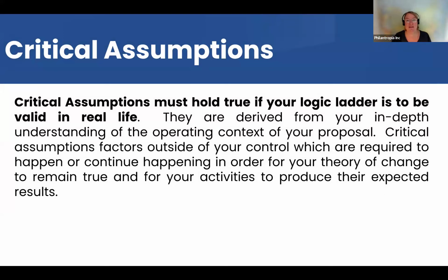So critical assumptions are things that you assume will happen, and they need to happen for your project to be a success. So there could be things like the climate will stay the same, or the teachers we train will stay with our school, stuff like that. So things you assume will happen, and only if they happen, the project will be a success. This shows how well you know the project that you're planning here, that you're describing. It gives you another opportunity to show your in-depth knowledge of this.